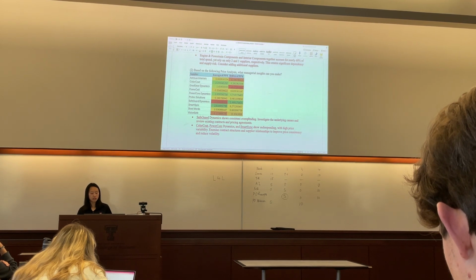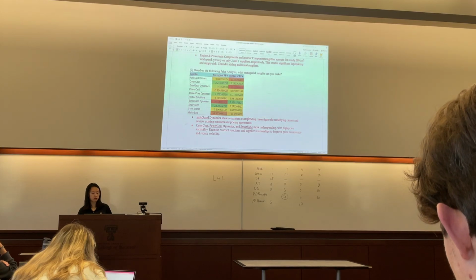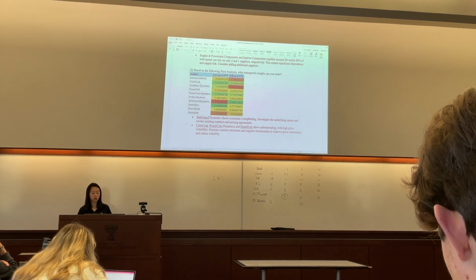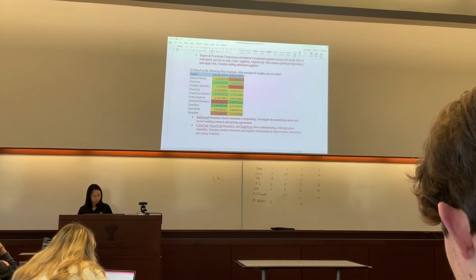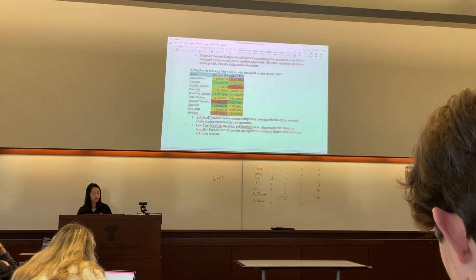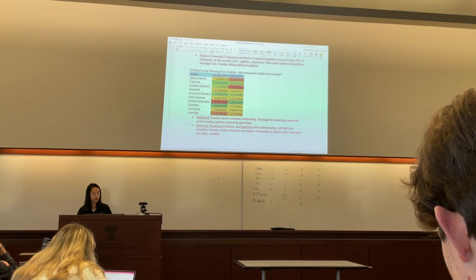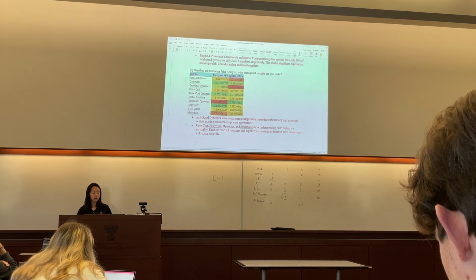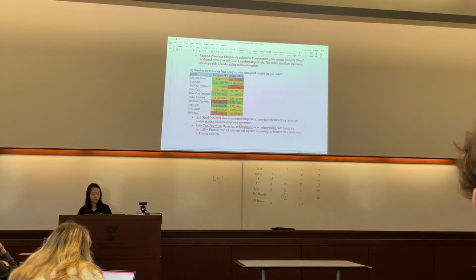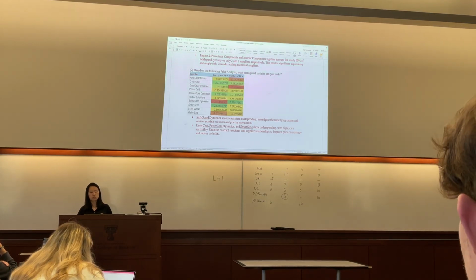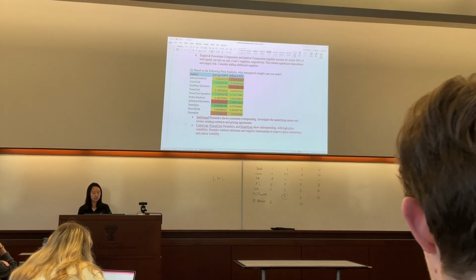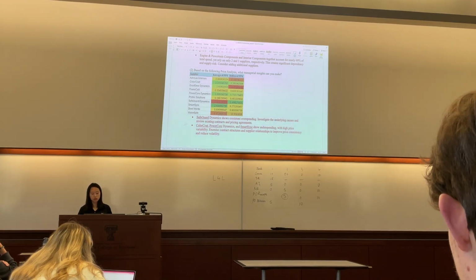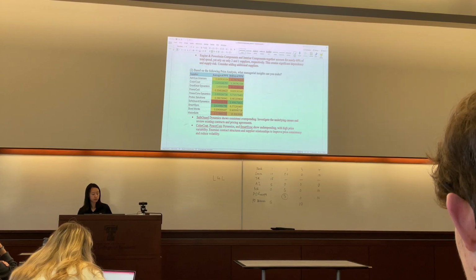Then we can investigate the underlying causes and review existing contracts and pricing agreements to see what happened with them. And for color code, power cord dynamic, and smart sync, they have a relatively high value for the average, shown in green. That means we underspent for those suppliers. We spend less than we thought, which sometimes is a good thing, but if you consistently underspend for those suppliers, and they also have very high price variability, then we also need to investigate what's going on.